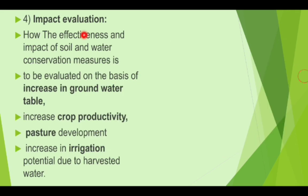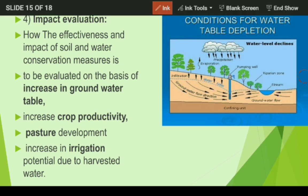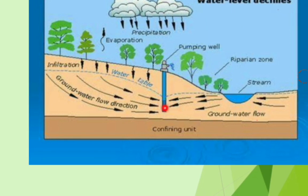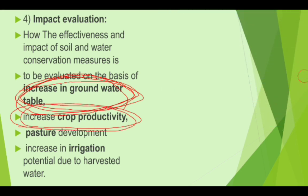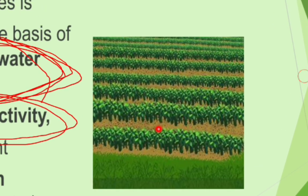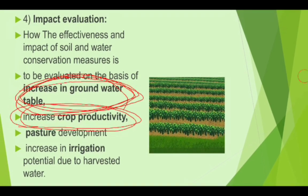Number four in evaluation is impact evaluation. The effectiveness and impact of soil and water conservation measures is evaluated on the basis of increase in groundwater table. If the groundwater level has been increased, that may be correlated as a result of our development activity. The second criterion is whether crop productivity has been increased — if it is increased, we can say we have a positive impact; if decreased, the work has not had a positive impact.